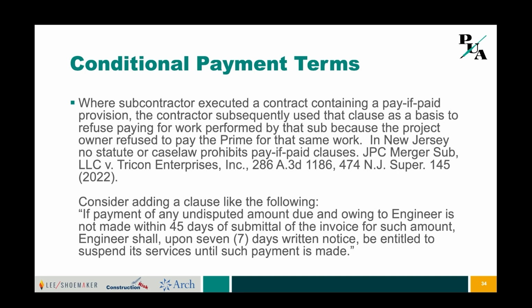One of the things at the common law in most states, that is the law if there's not a contract, is that payment is a material term to any contract. And so if someone's not paying you, you have the right to stop work. But if you agree to a conditional payment term which says, I'm not entitled to payment until this event occurs, and that event takes a long time to occur, your ability to suspend services in the manner that Kent has just described is impaired by the very contract language you've agreed to. So including appropriate language or qualifiers on conditional payment terms as a sub is a good practice.